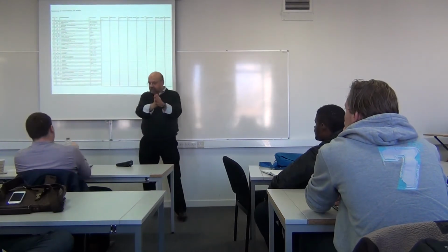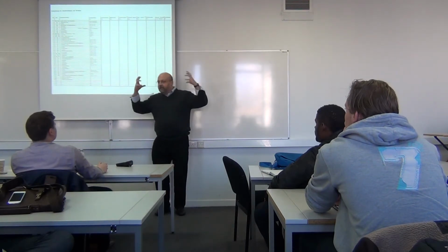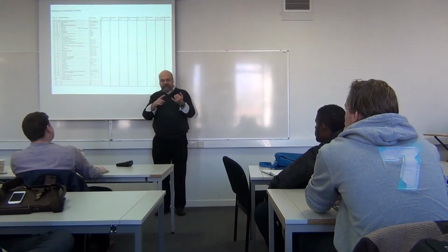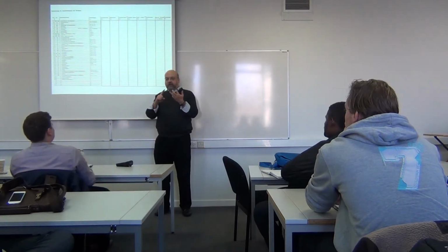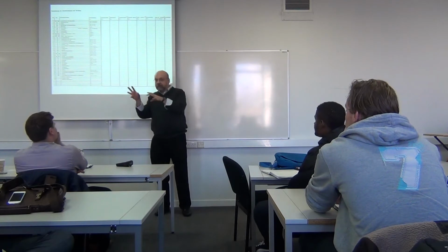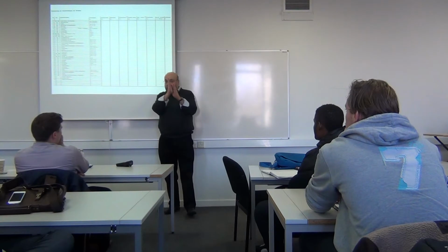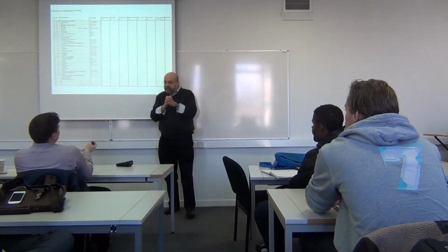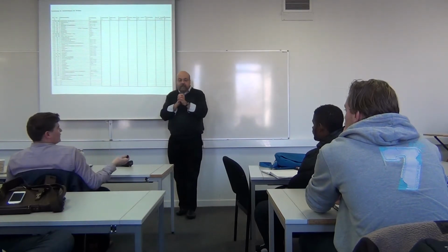Not only the works on the site, I have to schedule that, that's clear. But I also have to schedule the works in the office, in my main contractor's office, where the people are sitting and working on technical specifications, on documents for the bidding of future subcontractors. For all my consultants, I have to have a plan to know these time spans. We call that here your lead-on time. Leading time. Lead-on time. Leading to the contract.